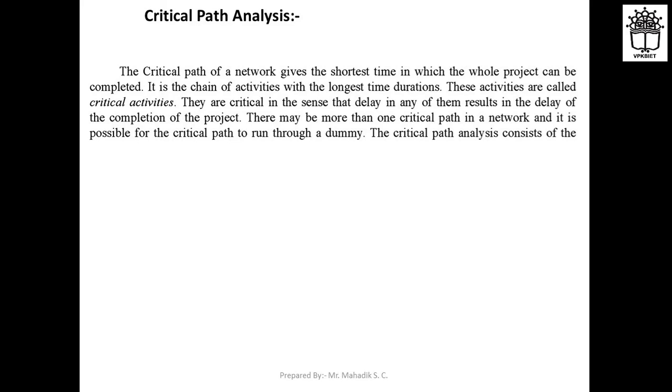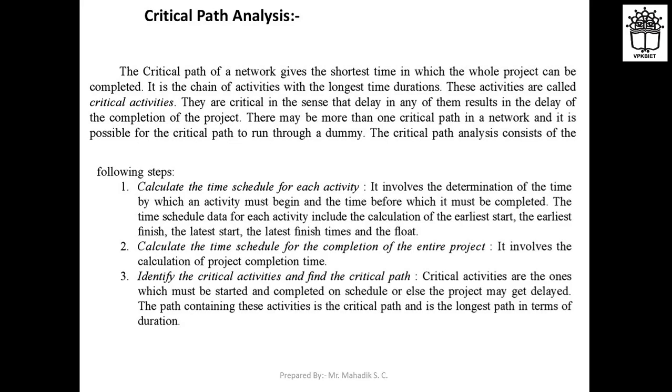So critical path analysis consists of the following steps. First, calculate the time schedule for each activity. It involves the determination of the time by which an activity must begin and the time before which it must be completed. The time schedule data for each activity include the calculation of the earliest start, the earliest finish, the latest start, the latest finish time and the float of the activity.